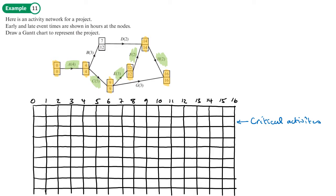So for example, this bit here is the first hour. The first hour goes from time zero to one. This is the second hour, third hour, fourth hour. So the times we put at the sides of the box on the lines, and then the actual duration is between them. So activity A starts at zero, and it continues to four. So this would be activity A here. And we'll just put the letter A in it so we can see them.